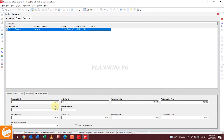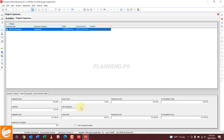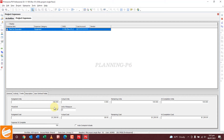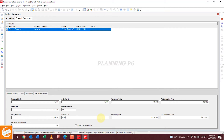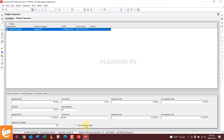The price per unit is 12, and the unit of measure is — you can write cubic meter, running meter, or similar units. Then the budgeted cost is this one and actual cost is here. This will be automatically updated when you update your project.